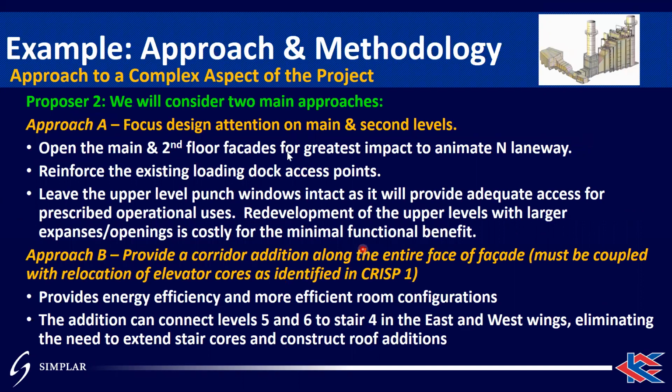They said, look, we don't have the right answer now, but we're going to consider 2 main approaches. Approach A: We're going to focus our design attention on the main and second levels. If we can open up the main and second floor facades, we'll give the greatest impact on the north laneway that's existing there. That'll also allow us to reinforce the existing loading dock access points. We would need to do that.